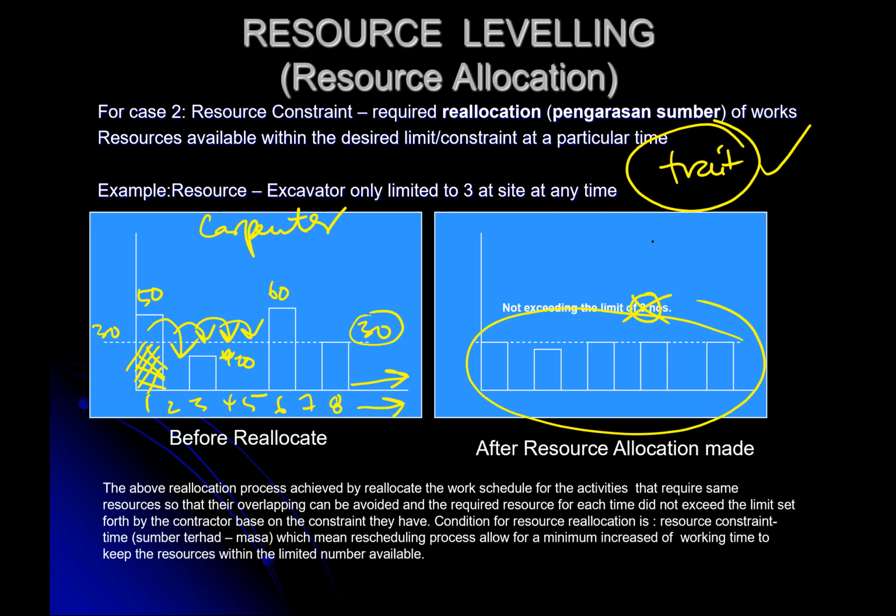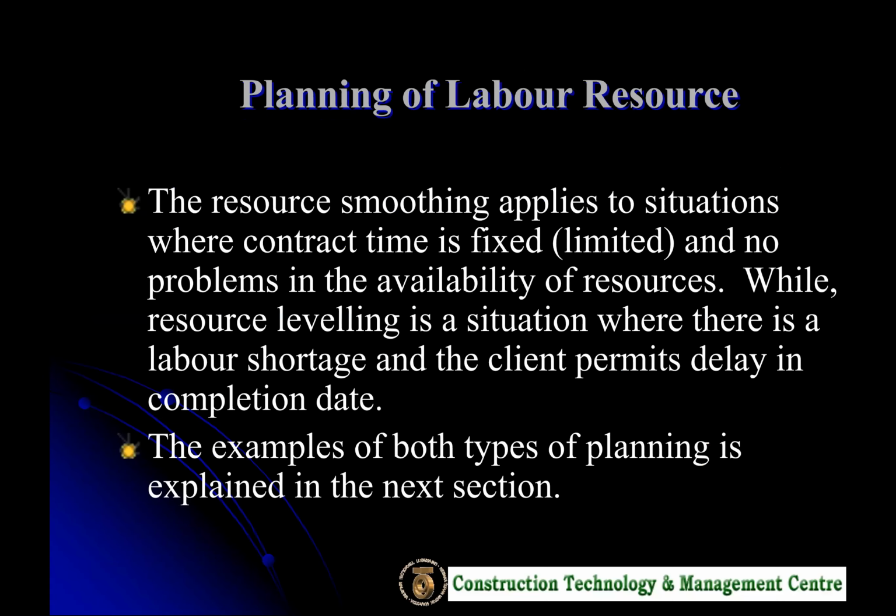You cannot basically put 3 tower cranes, because the space is very limited. So you are doing what we call resource leveling. Because you only have one crane, you need to adjust the work activities. Not all the activities can be done simultaneously, because the crane itself is very difficult to move around, spinning around to focus on different areas at one time. So you just imagine the difficulties.